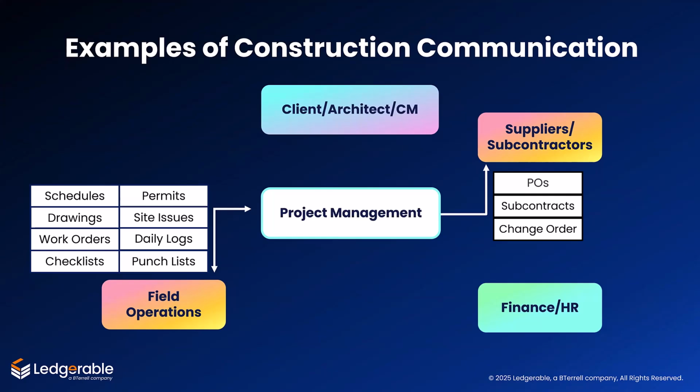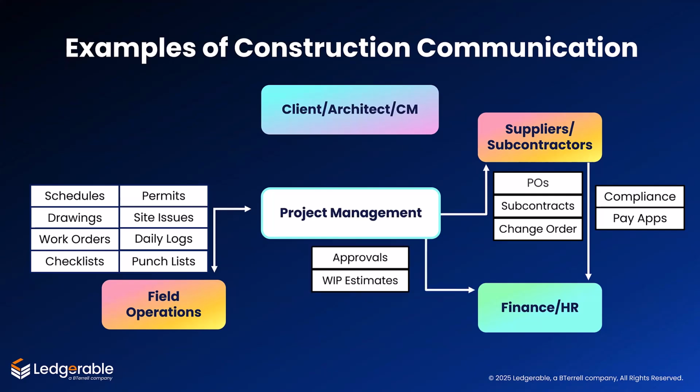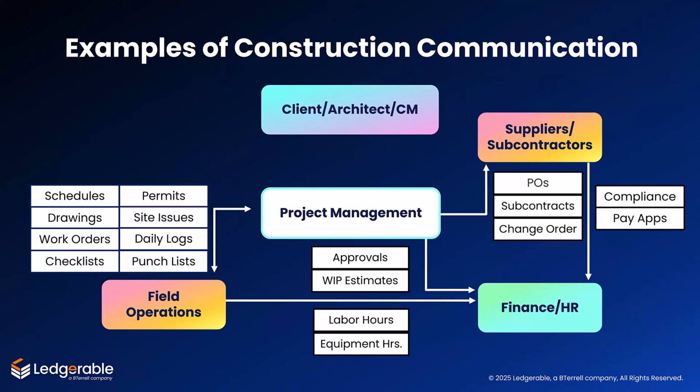And subs must submit COIs and licensing and lien waivers before receiving payment. PMs must be involved in approving project-related transactions before they're approved by finance. And field ops captures and submits labor and equipment hours. And finally, PMs must keep the client and external stakeholders up to date on any issues as well as progress made towards completion. It begins to resemble a complicated symphony with each stakeholder playing a key role.